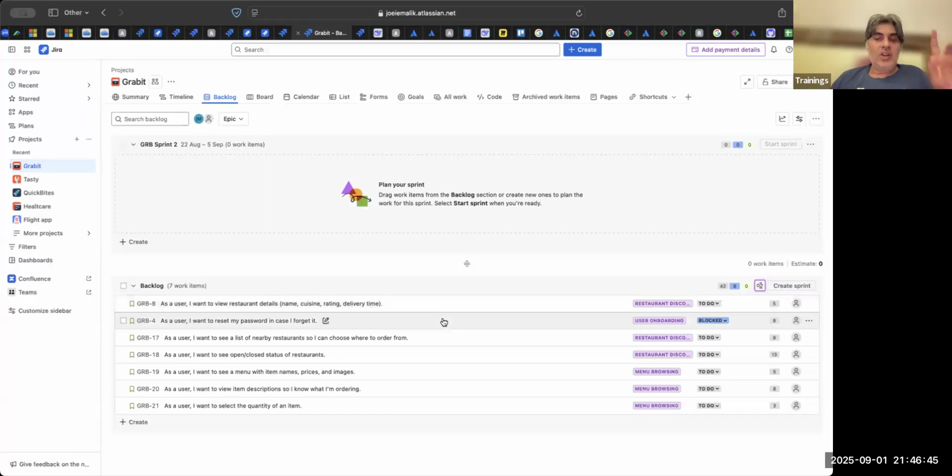So in the retrospective, we say, okay, we could not identify an API. Because of that, the spillover is there. Next time, we will try to identify APIs. We'll learn from it, so lessons learned, we can put it thus. So now the SM says, boss, I have spoken to them. They will give the story.